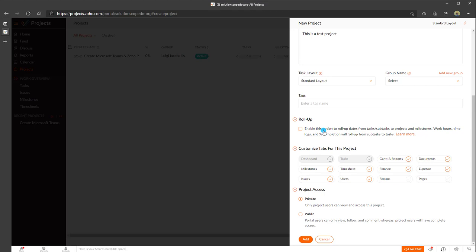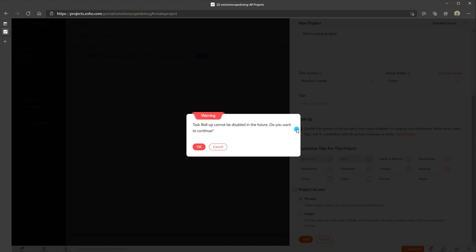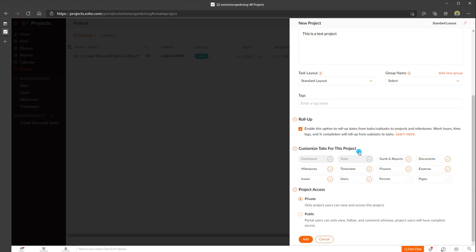In terms of roll-ups, Zoho Projects gives you the option to roll up dates from tasks and subtasks to calculate the overall duration on your project. By default this is turned off for flexibility. If you do want roll-up, you can check this — though it will warn you that this cannot be disabled in the future. The last options allow you to customize the tabs for the project, which adds tabs to your project record, some of which require other Zoho products such as Zoho Books or Zoho Expenses.